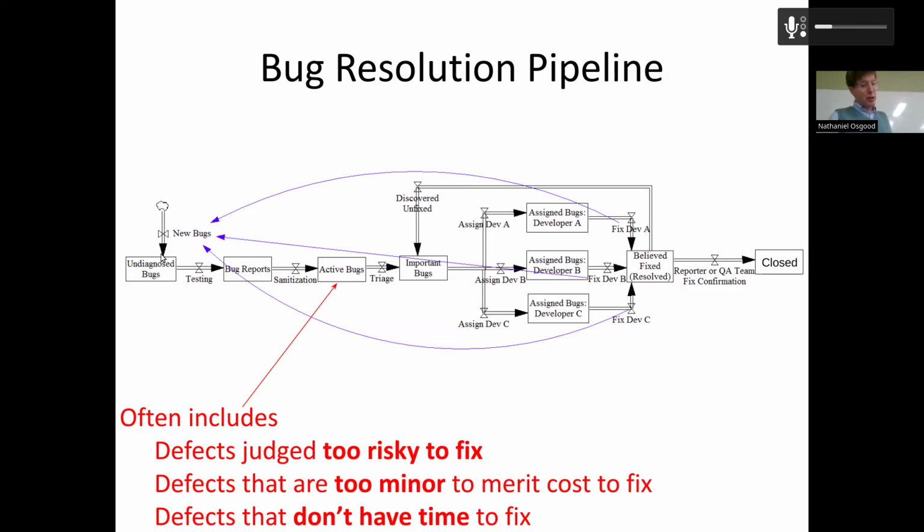And one of the key things is there's a long delay before these get perhaps reported as defects, before they get sanitized as reliable defects. And so if you've got to ship soon, you may be fixing a bug, but you've introduced new defects that are yet undiagnosed. And the cycle continues, and you might not discover these before it's in the user's hands and it stops working.